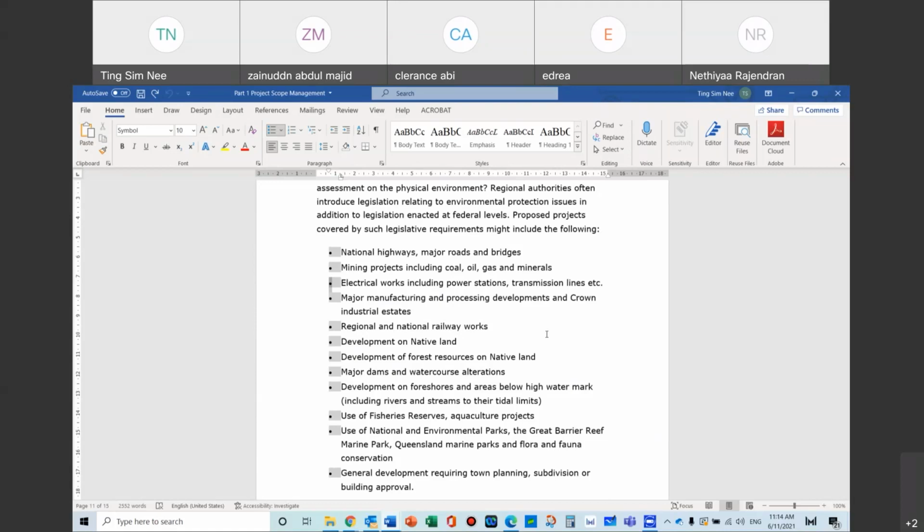We just have to answer a few questions. After you draw the chart, you will see right in the center is your project. The question is, will any of this actually make the project stop? Will any of this not be able to be overcome and your project will be stopped? That is the first question you have to answer. Will any of this make the project not worthwhile? That is another issue you need to worry about. Will any of this make it so that you don't have the financial capacity to do that?